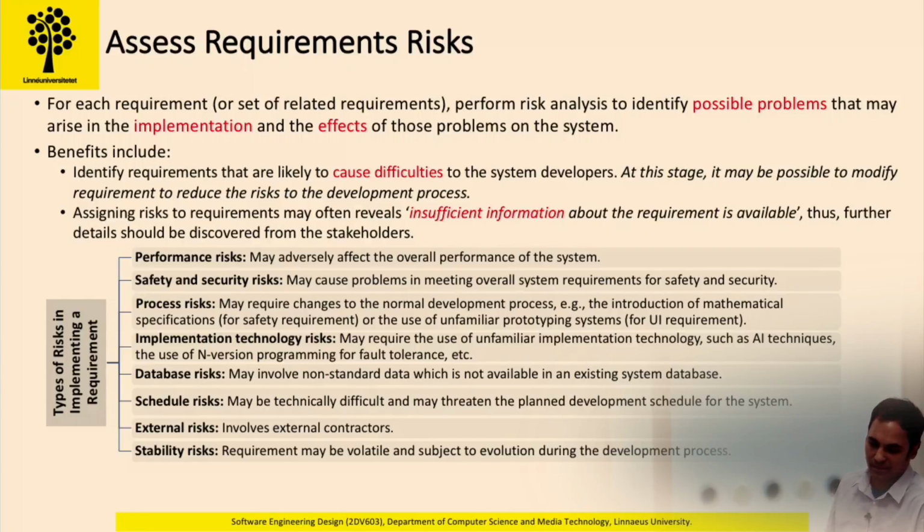It might have process risks. So our regular process might not be enough to implement this requirement. For example, we might need unfamiliar prototype systems, or maybe mathematical notations for safety requirements. Then we might also have implementation risk. So that is more about technology.